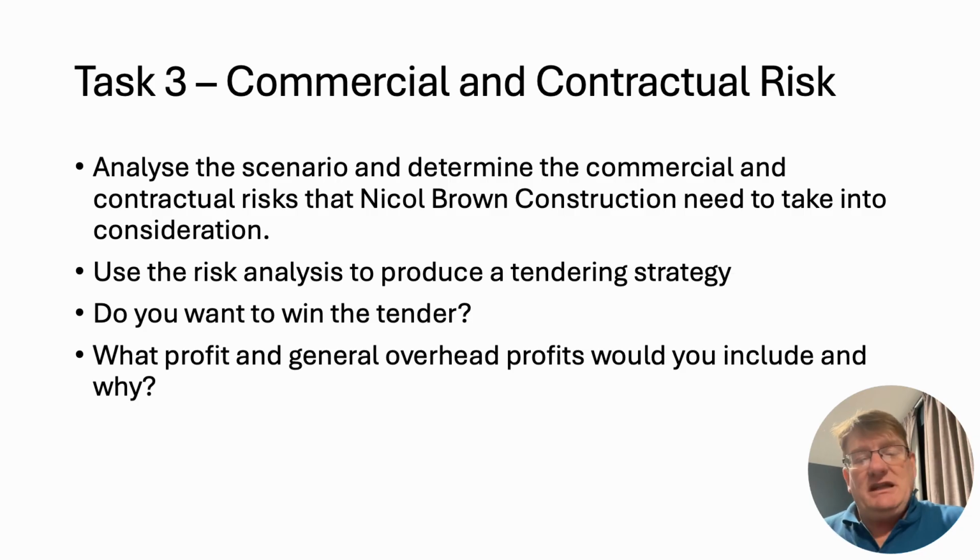You may have a lot of work on, so you may be working at 100 to 120% capacity. Therefore, another contract coming up might be out of scope for you because everybody's employed. All your site managers are working, all your quantity surveyors are working, all your planning engineers are working, etc. So what do we do in those circumstances? Well, we'll probably put in what we call a cover price, which will be a price with a large profit margin added to it,